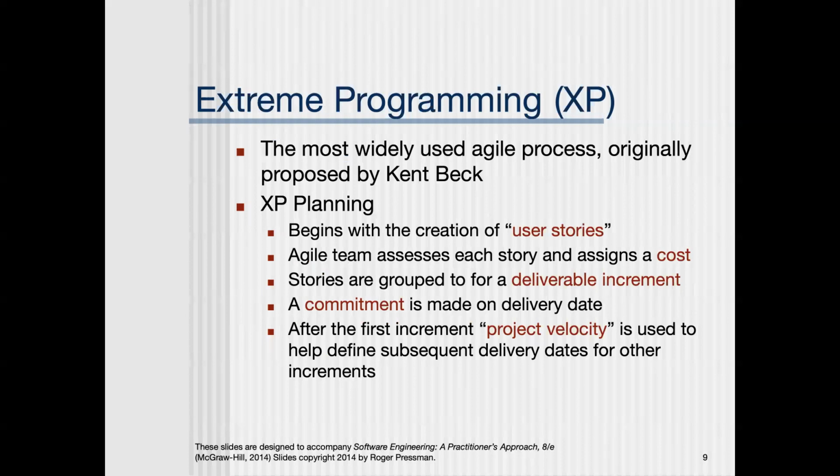But the idea behind extreme programming is a sound idea. I think it makes a lot of sense. I would like us to do an example of that if we can, if I can figure out whether we bring enough laptops or something on one of our Fridays. But again, it starts with this idea of a user story. You ask the user, how do you see this software working? The team then will assess each story and assign a cost to it, and we'll look at some techniques for that. These stories are then grouped together. That becomes a stage in the process, a deliverable increment. When we talk about deliverables, I don't know if I've defined that term.